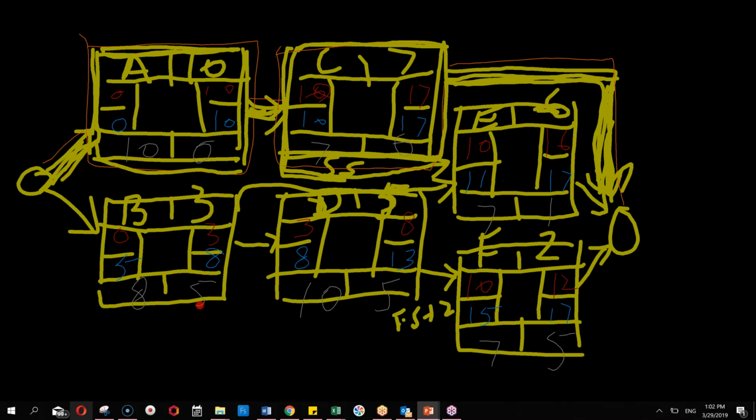As far as B, D and F are concerned, all have 5 days float. That does not mean that each one of them has 5 days float. Actually, this 5-day float is the total float of the path. BDF path has got a total of 5 days float. This is called total float. If B consumes 1 day out of it, for D and F there will only be 4 days float left. If B consumes 3 days out of 4, F will have only 1 day float left. So you see, 5 is shared by B, D and F. So they can jointly consume these 5 days. E is alone. E alone can consume 1 day.